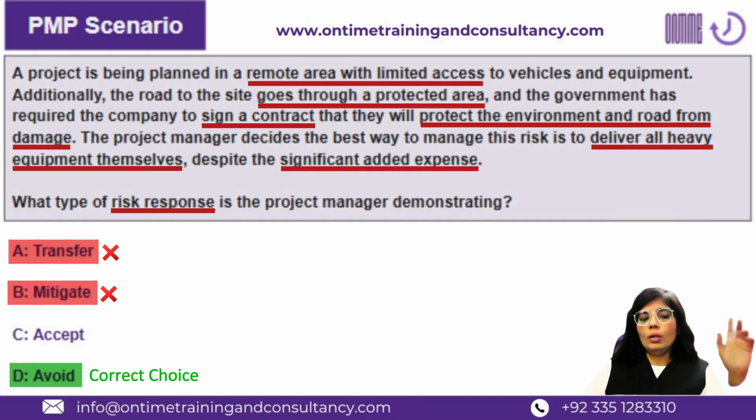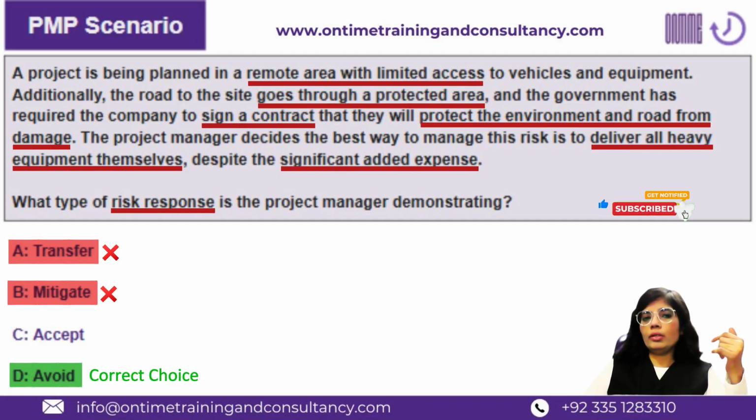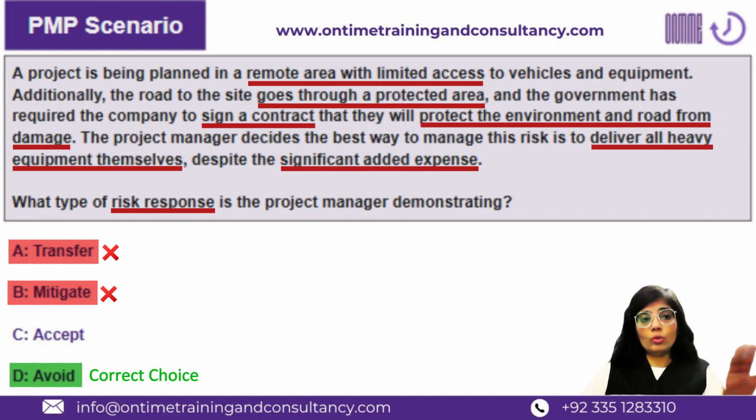as some of the people have thought. He is not mitigating. He is clearly making sure that whatever it takes, I do that. He is putting everything at stake. He's taking all the chances, right? So he's not mitigating. This is not mitigate. He's not leaving any stones untouched. Mitigating would have been that the project manager has tried his level best with the available resources, available budgets, and whatever was there in the contingency. No such description is there.